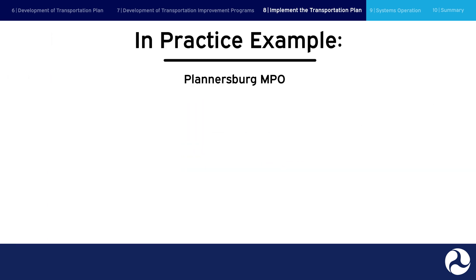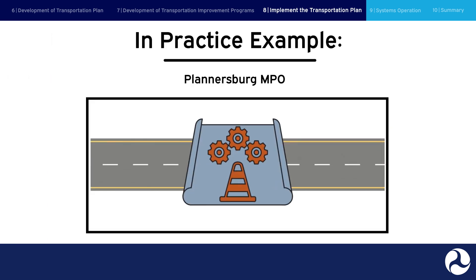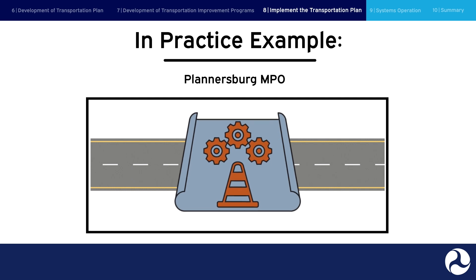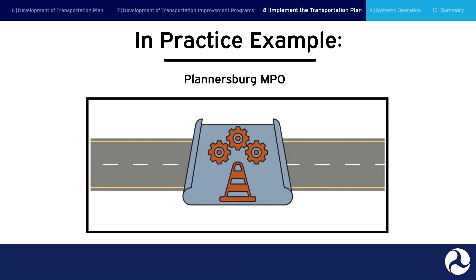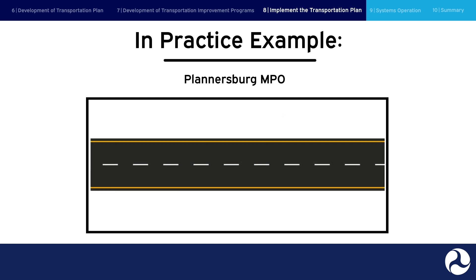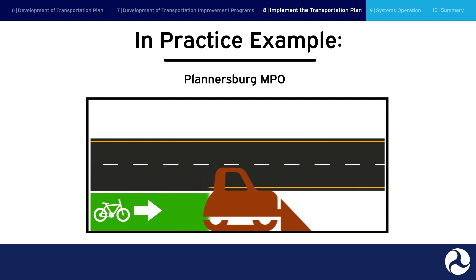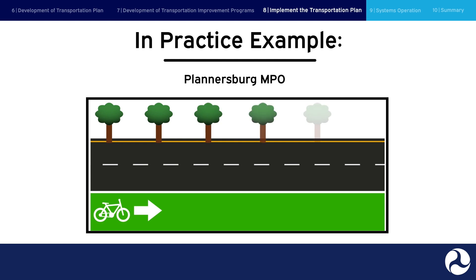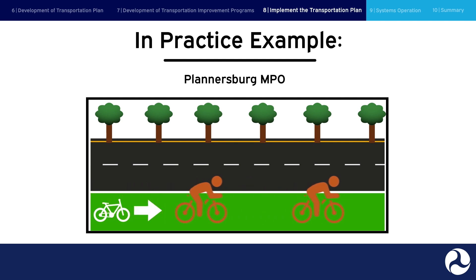In practice example: the project is included in the TIP and the local Public Works Department begins work to design and build the facility. The city secures a landscape architecture and engineering consultant to move forward with designing the bike lane. During the design process, the city pursues environmental clearance and obtains required permits. Once the design and environmental review are completed, the land necessary for the bike lane is purchased and the project is put out to bid. A contractor is selected, and construction commences.